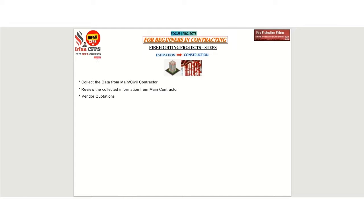The third step is to get quotations from various vendors or suppliers by sending the RFQs for all the materials or equipment that are going to be used in the particular project.